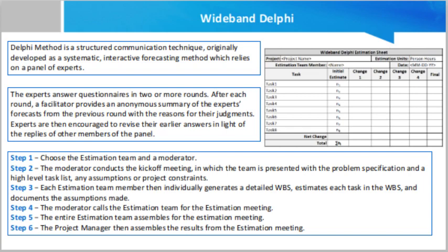Step 5.8 — each team member revisits his or her task list and assumptions and makes changes if necessary. The task estimates may also require adjustments based on the discussion. The team members then once again combine the changes in the task estimates to arrive at the total project estimate. Step 5.9 — the moderator collects the changed estimates from all members again and plots them on the round three line. Again, in this round, the range will be narrower compared to the earlier one.